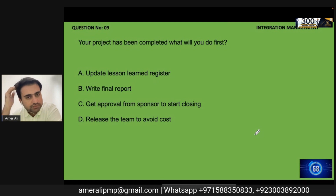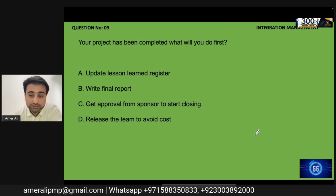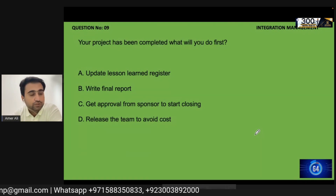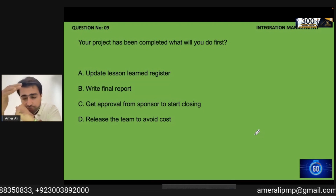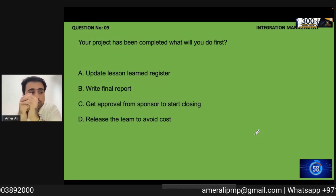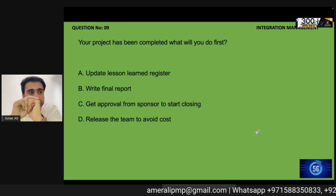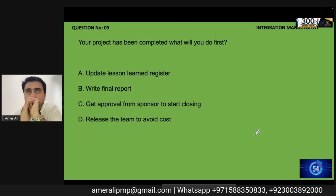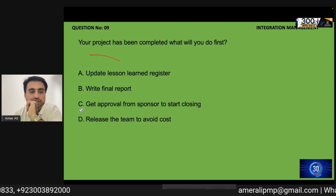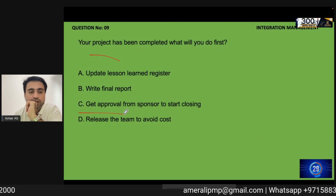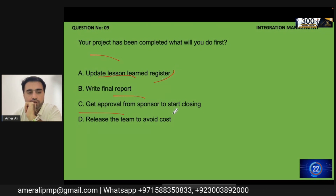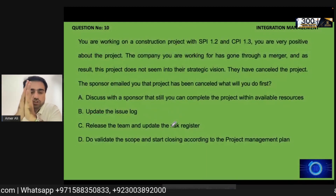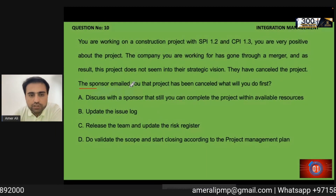Question: Your project has been completed. What will you do first? The closing sequence is: first, get approval to start closing, then write the lessons learned and final report, and after that, release the resources. I hope this sequence makes sense.